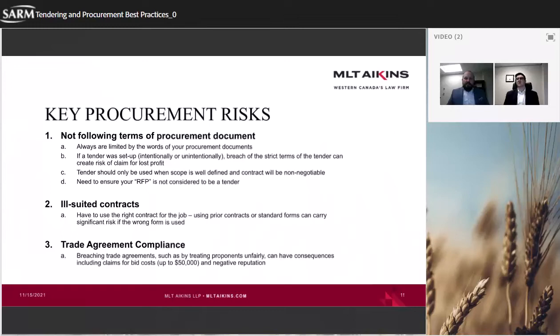And all of a sudden what we're seeing is we're setting ourselves up for a 50-day project because budget is so sensitive, but it's only a 30-day window. So it's something to think about, that we want to make sure that our form of contract aligns with our project priorities.